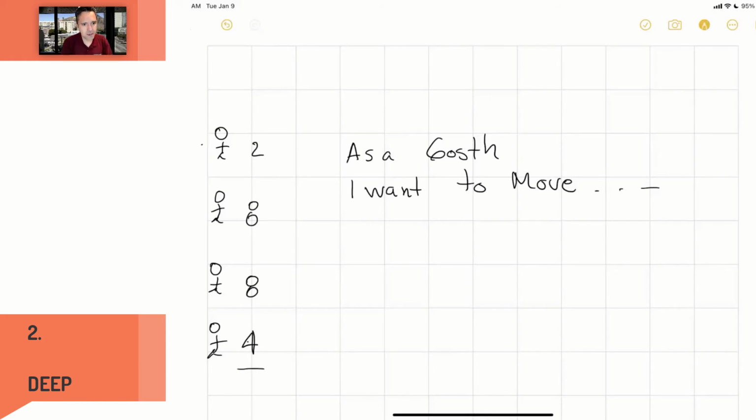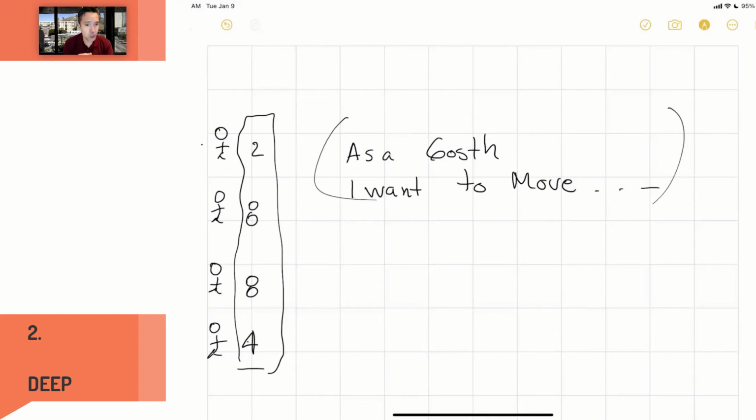These numbers, what I am going to do is obviously consider all of them. I am going to use all of them and extract the average for my team. The number at the end is going to be the complexity of this task, not for one person, not for the majority, but for the team. These numbers help me to classify the difficulty of all my stories, but also those numbers tell me a lot about the technical skills of my team.